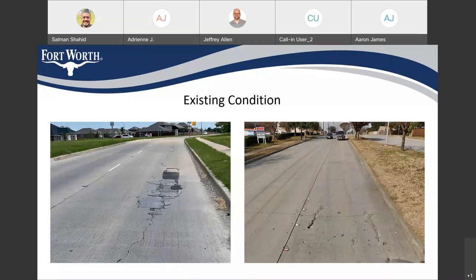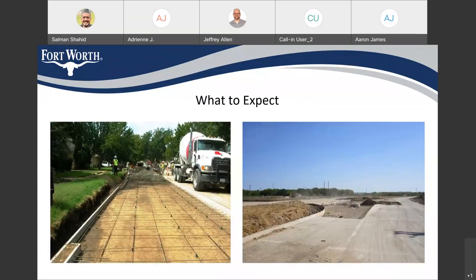This is basically the existing condition of the road right now. What to expect during the construction: we'll be removing all the damaged panels and we'll be putting reinforced concrete for these panels. In the picture, you can see how individual panels are being constructed — something similar you will be seeing on the site. We'll be fixing any base failures, then putting in reinforcement and concrete to match the existing pavement.